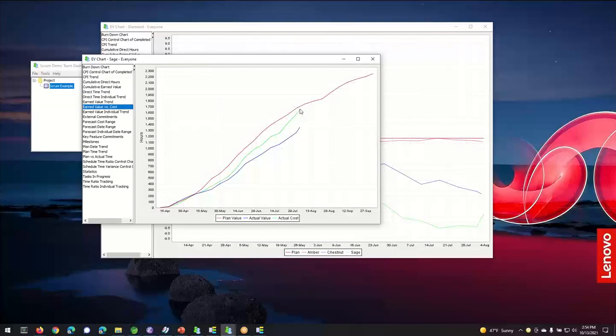The number of hours they're getting in per week is similar to what their capacity was, but the number of hours that the work is taking is more than the number of hours they thought it would take. Work is just taking a lot longer. So basically, what this means is that the team was able to estimate their capacity really well, but when they sat down and estimated how many story points each work item was going to be, their story point estimates were all under. And so that caused them to bite off more scope than they could chew. That's a completely different problem than the capacity problem, and it's going to require a completely different remedial solution.